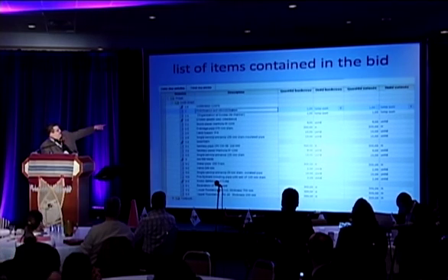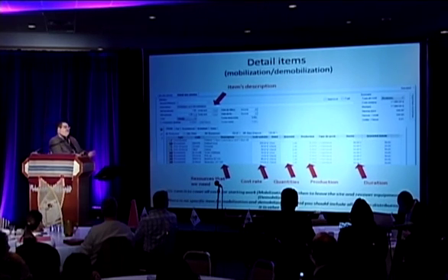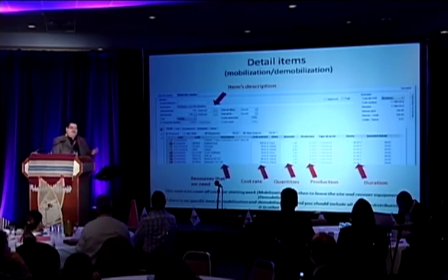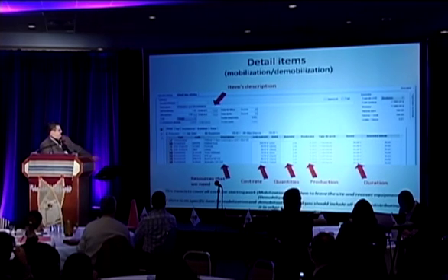So what we'll be looking at is number one, which is the mobilization and demobilization. When we're talking about mobilization and demobilization, that means when you get a contract, you have to get your people to the site, you have to get your equipment, you might have to bring in your own camps, your kitchen. So this is what's in the mobilization. If you see in our program in Progest, it'll indicate to us the resources that we need, our cost, and the quantities, the production.